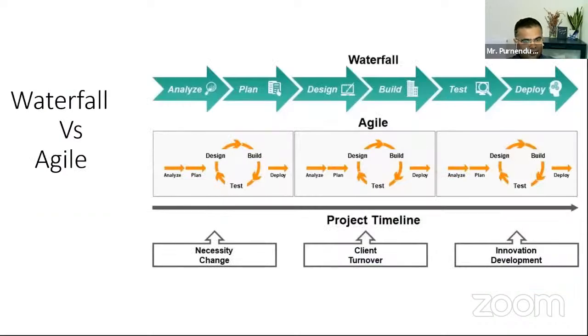So I think I've talked about this basically in middle of it. But if you see this slide, so waterfall actually, you get to see the product only at the end of the cycle. And let's say in the simplest word, if it is a 12-month project, user will only have a good idea about their product, what they are going to get, somewhere in 8 to 9 months when you actually hit the testing phase, right? By that time, it might be too late. By that time, the requirements might have changed, and it is very, very common phenomena.